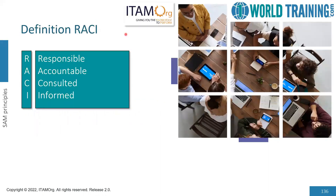We have here the concept of RACI — R, A, C, I. R for responsible, A for accountable, C for consulted, and I for informed. Organizations must clearly define all the roles when designing the software asset management processes. The RACI model offers a clear and easy way of tracking who does what in each process and allows speedy and confident decision making. Responsible refers to the person or people responsible for accurate execution or getting the job done — it is about execution.